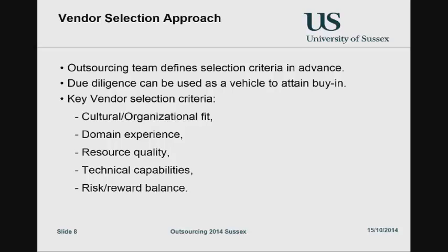Okay, the vendor selection approach. Outsourcing team, you put somebody in charge of it. Define the selection criteria in advance. Why would I define the selection criteria in advance? It's rather obvious. Yeah? Quite, because very probably you can eliminate the no-hopers very early on.